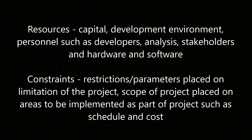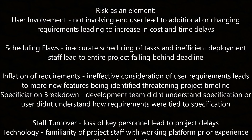Project management. Resources in a development environment include personnel such as developers and analysts, stakeholders, hardware, and software. Constraints and restrictions are based on the limitations of a project, including the scope, schedule, and cost. Risk elements include user involvement — not involving the end user leads to additional or changing requirements causing increased cost and time delays. Scheduling flaws: inaccurate scheduling of tasks and poor deployment of staff leads to the entire project falling behind the deadline.